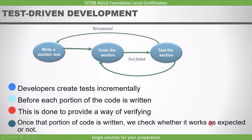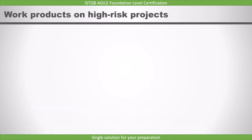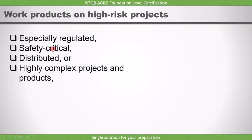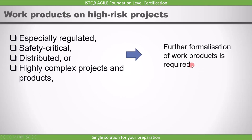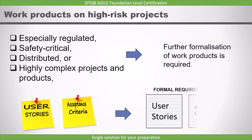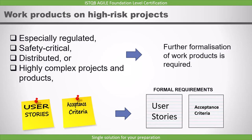The last point is work products on high-risk projects. In some Agile implementations, especially regulated, safety-critical, distributed, or highly complex projects and products, further formalization of work products is required. For example, some teams transform user stories and acceptance criteria into more formal requirement specifications. How to do formalization is not part of the syllabus. You just need to remember that more formalization of work products is required in case of safety-critical projects.